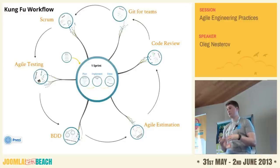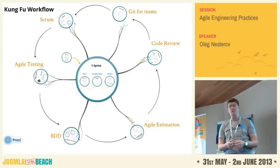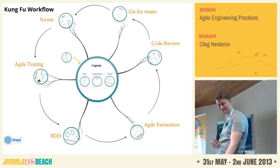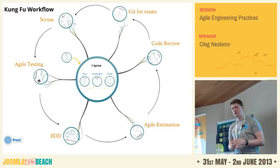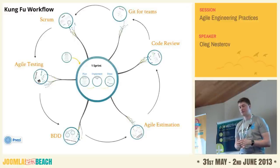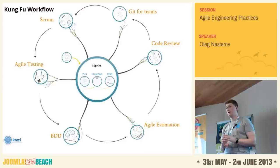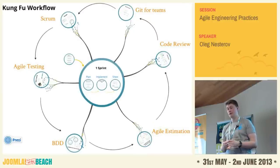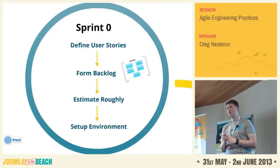Since we have a dedicated quality assurance person, they can work on the testing approach and prepare the test strategy, choosing what software we will use to help with testing. In Scrum there is a term called Sprint Zero — that's where you gather specification, because we don't yet know what the project will be. You get a specification and set up routines like servers and git repositories.